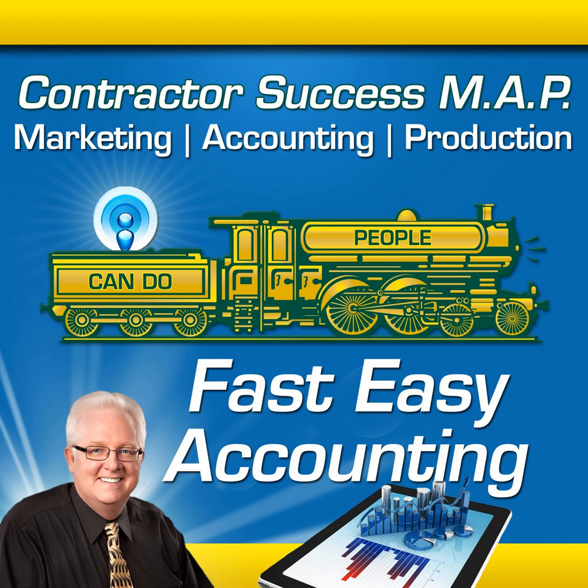So when is a good time to ask for payment? When the contract is signed, ask for a deposit. Progress payments: every week, perhaps on Monday, you could review the work completed the week before, issue a simple invoice, or give your customer a comprehensive payment application and get paid.